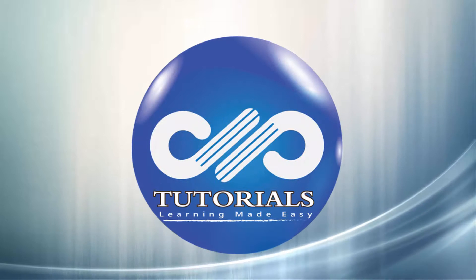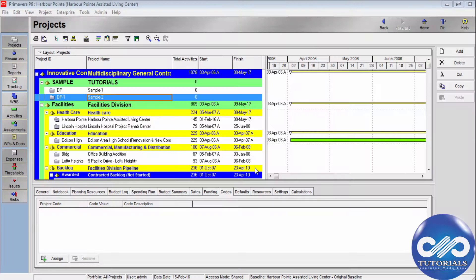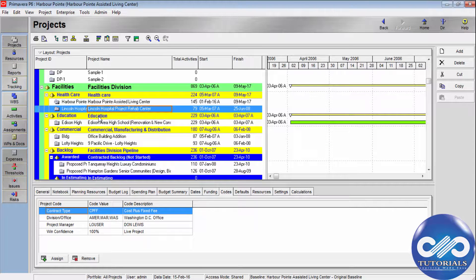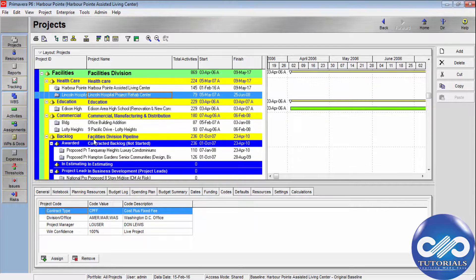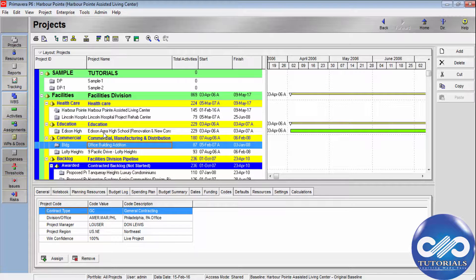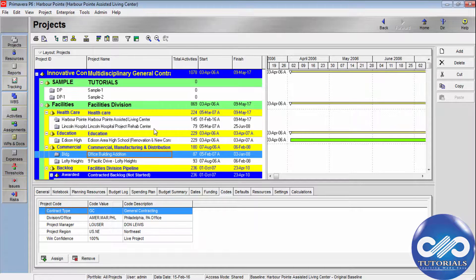Hello, welcome to DP Tutorials. In this tutorial, let's learn about project codes in Primavera. Using project codes, you can organize projects in the EPS enterprise project structure in groups according to specific categories such as location, division, etc. Using project codes, we can arrange projects hierarchically based on the required category. In this tutorial, let's see how to set up project codes, assign them to projects, and use these project codes to organize your layouts.